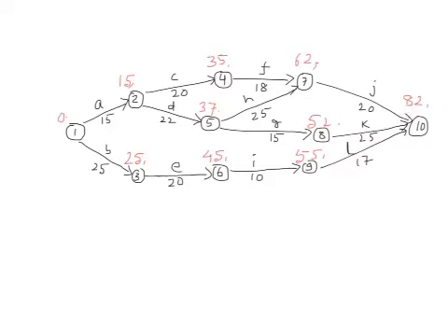Now this 82 we got from 62 plus 20, that is from this line we got, not from this or this. So we have to do this activity J in timely manner. So we can say that this will be on the critical path here.